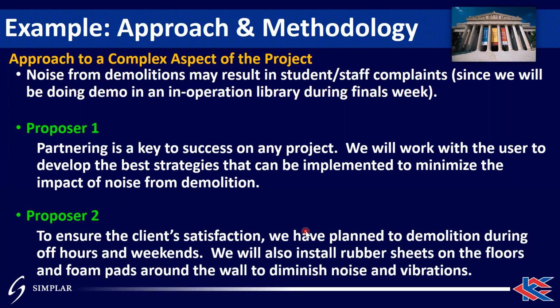So here was another response that came in on that project. To ensure client satisfaction, we plan to do demolition during off hours and weekends. We can install rubber sheets on the floors and foam pads around the wall to diminish noise from vibrations. I do remember they had another sentence that provided some performance metrics and outcome information, saying, hey, we've done this on 8 other projects, and all of those clients seem to like it. We never had a complaint during that demo phase with in-operation facilities. So they provide a little bit more proof that way, in a blind and anonymous fashion.